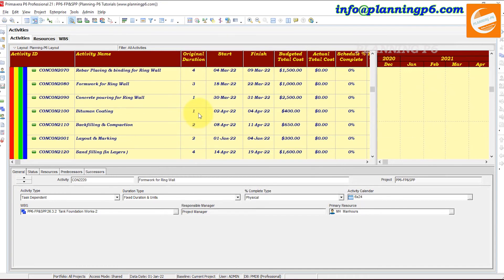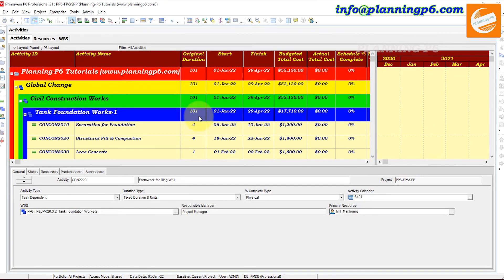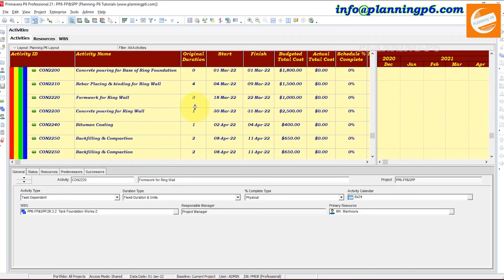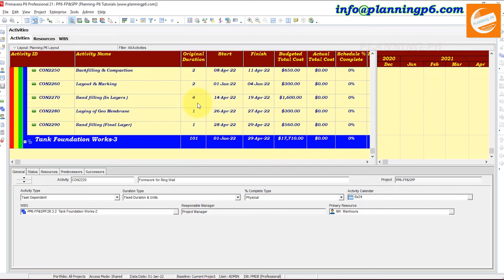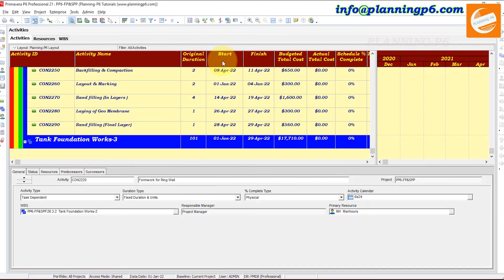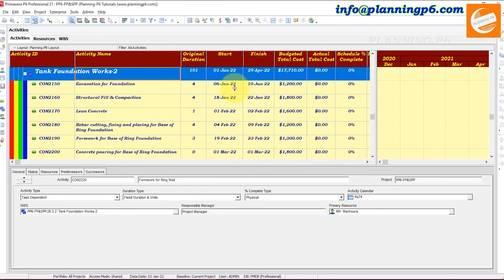After committing, you can compare — before, the duration was 120 days for this activity, and now it is reduced to 101. This is how Global Change works in Primavera P6. I have also prepared a separate YouTube tutorial on adding extra columns and using Global Change to modify duration, start, and finish dates for activities.